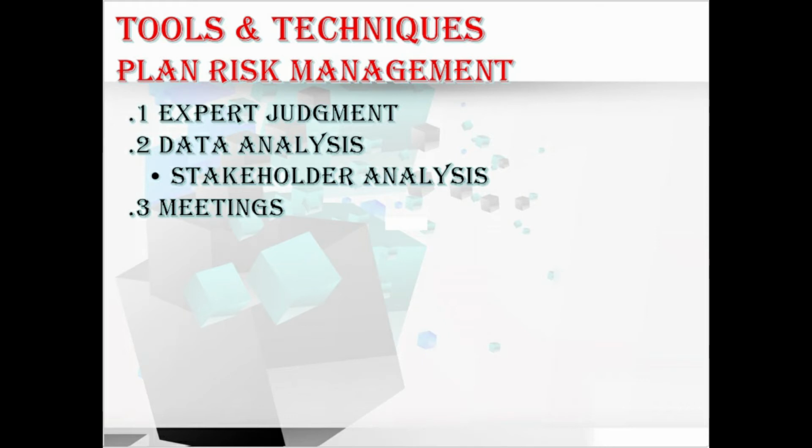We have meetings. In meetings, the risk management plan may be developed as part of the project kickoff meeting, or a specific planned meeting may be held. The attendees may include the project manager, selected project team members, and key stakeholders or team members who are responsible for managing the risk management process on the project. Also, the plans for conducting the risk management activities are defined in these meetings and documented in the risk management plan. Hope you understood the importance of this meeting. We have completed all the tools and techniques of this Plan Risk Management process.